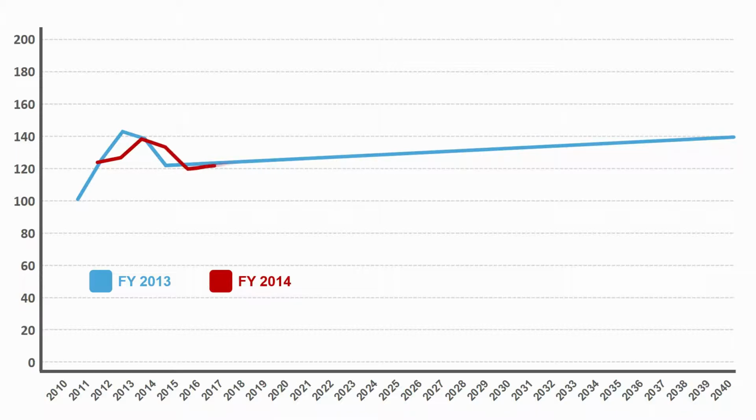The subsequent 4 years of the forecasted escalation again show an increase, a decrease, another decrease, and then an increase again. The 5th and final year of fiscal year 2014 guidance was then 1.5%. If we extend this escalation rate of 1.5% out into the future, we then find that the price of a barrel of fuel is nearly $177 in 2040.